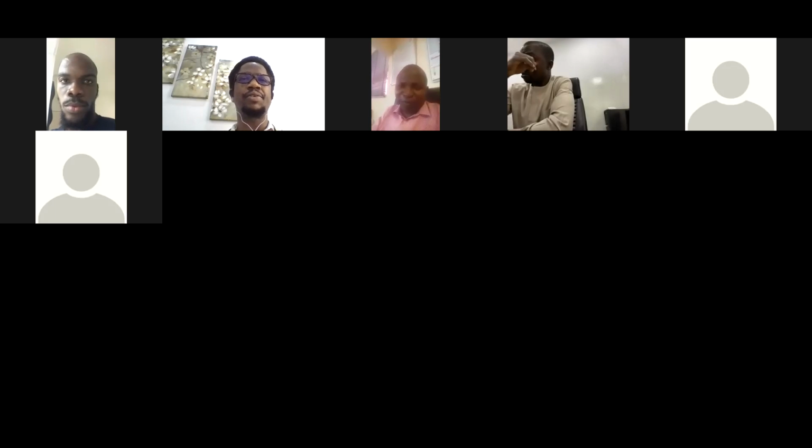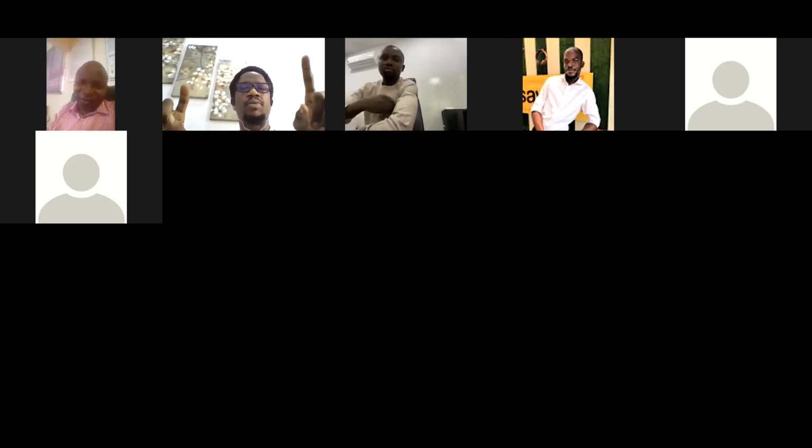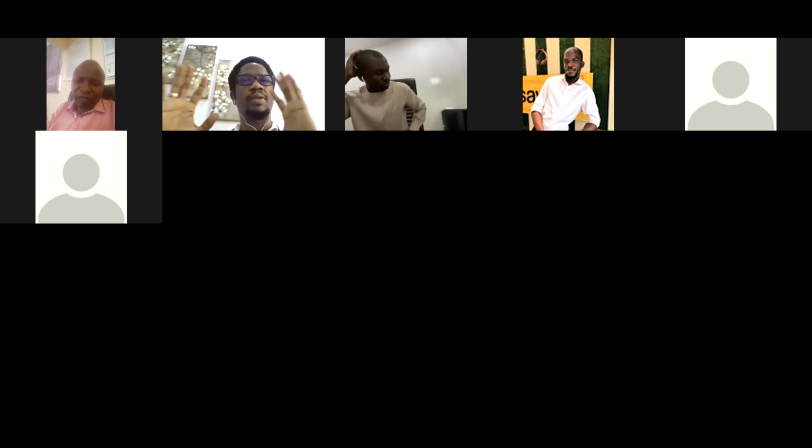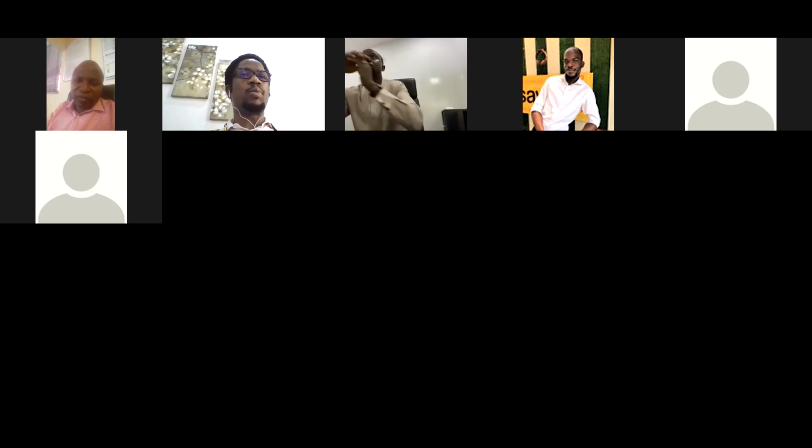Thank you. That was actually teaching the whole class again. One thing that I would like to stress a bit is that since you know the components of an AC, you can now come up with maintenance scope activities for each component. So don't just say, "servicing my AC." When we did the maintenance class, I said try as much as possible to get rid of that word servicing so that it does not replace your maintenance scope. Your maintenance scope should be broken down. You know the main components of an equipment, and you know what needs to be done to each of those components so that you can continue to get long-lasting results or efficiency from them.